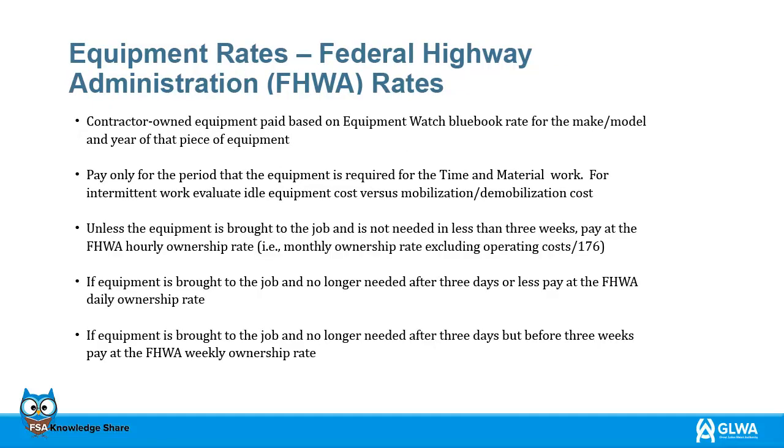If there is any contractor-owned equipment, it is paid based on Equipment Watch Blue Book rate for the make, model, and year of that piece of equipment. Only pay for the time that the equipment is needed for the time and materials work. For any sporadic work, evaluate idle equipment cost versus mobilization/demobilization cost.